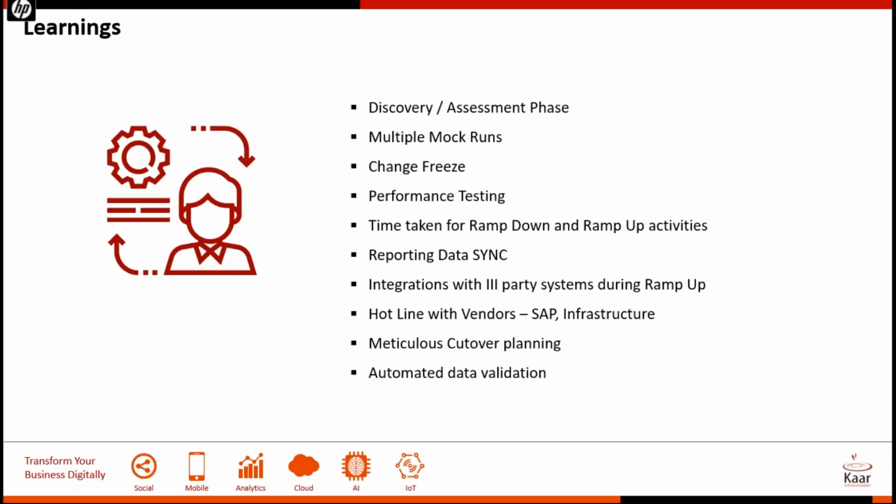The fourth one is performance testing. Why is performance testing important? Because once you go live, you're on new hardware, a new database, a new application. Users are finding new screens that they're trying to figure out how to run. So there are so many changes. So if you have not tested your performance end to end, you could potentially have problems and bottlenecks. So when you run your performance test, keep it as close to the production scenario as possible.